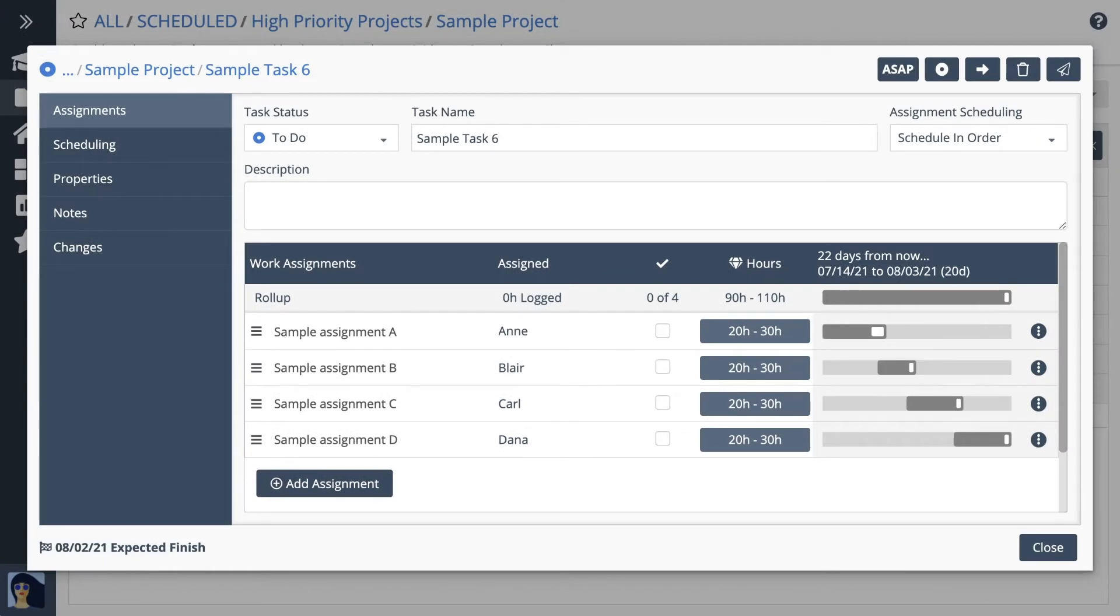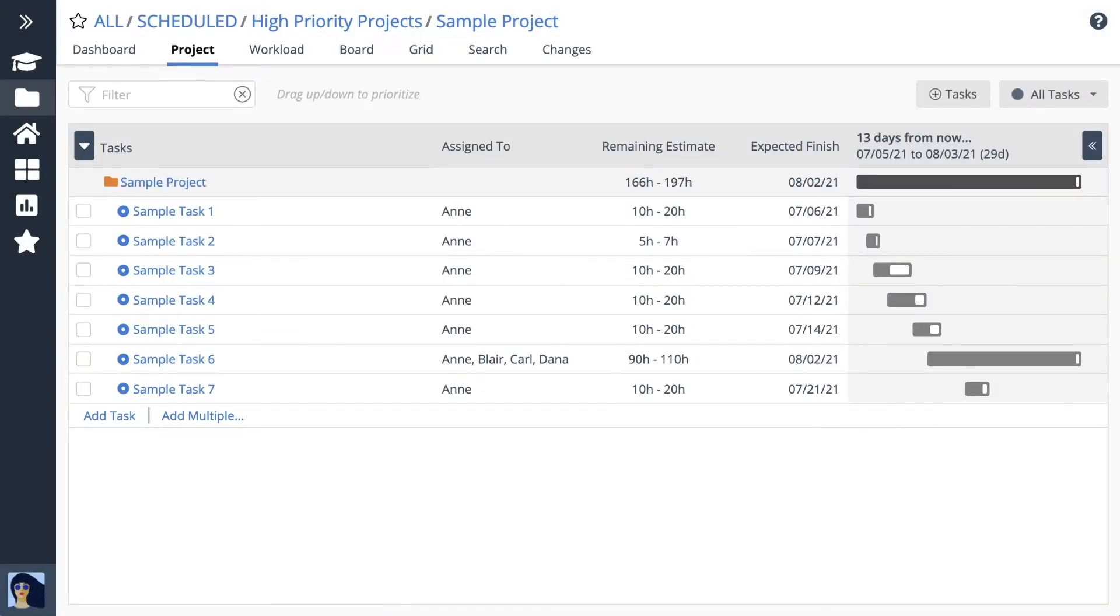As you can see, estimates and schedule bars are related. A schedule bar shows how long the task will run from start to finish based on the remaining estimate.